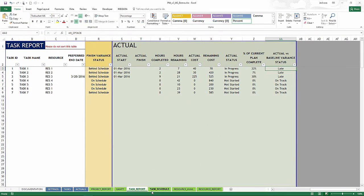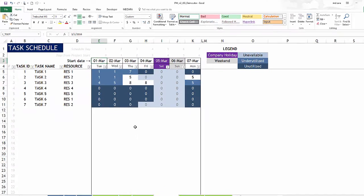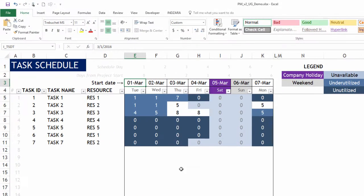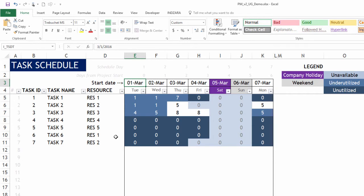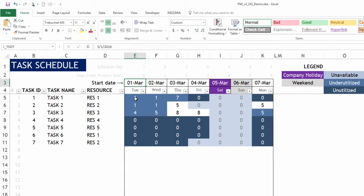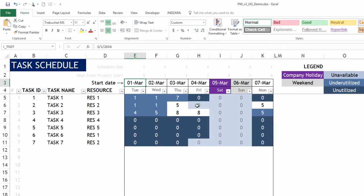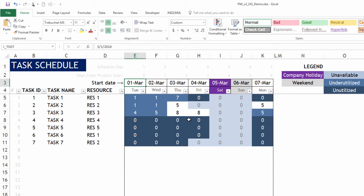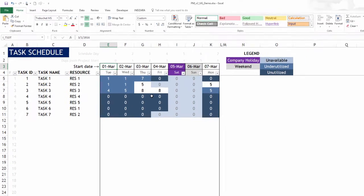So now the task schedule is what you will look for when you want to know specific number of hours of work that is scheduled to be done for any given task. So, for example, for task one, which is assigned to resource one, the number of hours of work that needs to be done is shown here for the next seven days. On March 1st, one hour of work will be done March 2nd, March 3rd, 7th. So this is basically the current plan in number of hours for each task. And this can be used to plan your actual work within your team.